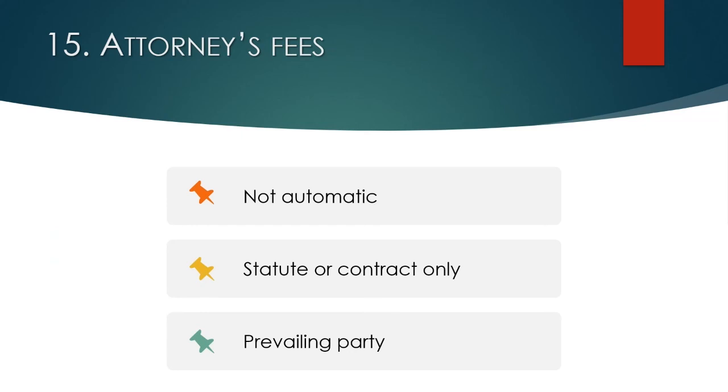But the garden variety attorney's fees provision in a contract that we see doesn't get you all of the relief that you might be entitled to as it relates to recovery of attorney's fees. And keep in mind, at least in Florida, that even though you won on certain issues in the case, a judge could determine that there was no prevailing party and nobody gets attorney's fees. So I always caution clients that, yes, we have a prevailing party attorney's fees provision, and yes, the judge could award them, but he or she might not.